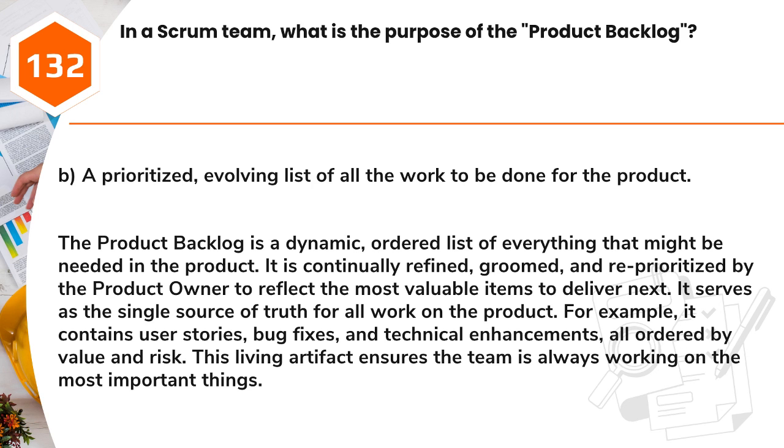It serves as the single source of truth for all work on the product. For example, it contains user stories, bug fixes, and technical enhancements, all ordered by value and risk. This living artifact ensures the team is always working on the most important things.